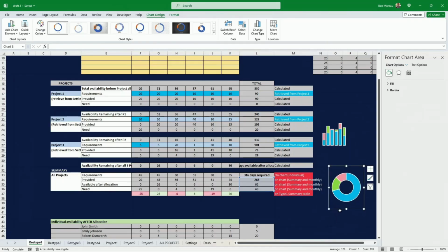So you might be asking the question, how can we have some that are available and some that are needed? But the thing is that it's in different months, obviously. This is why it's so tricky with resource management: you can have more resources in one month and not enough in the other month. So this is why all the project planning needs to be done with resource management in mind, which is not often the case.